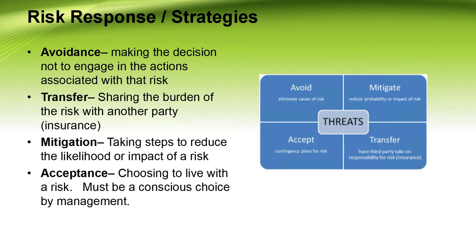And then acceptance. An organization recognizes a risk, identifies it, then accepts it. It is sufficiently unlikely or of such limited impact that corrective controls are not warranted. Risk acceptance must be a conscious choice that is documented, approved by senior administration, and regularly reviewed.